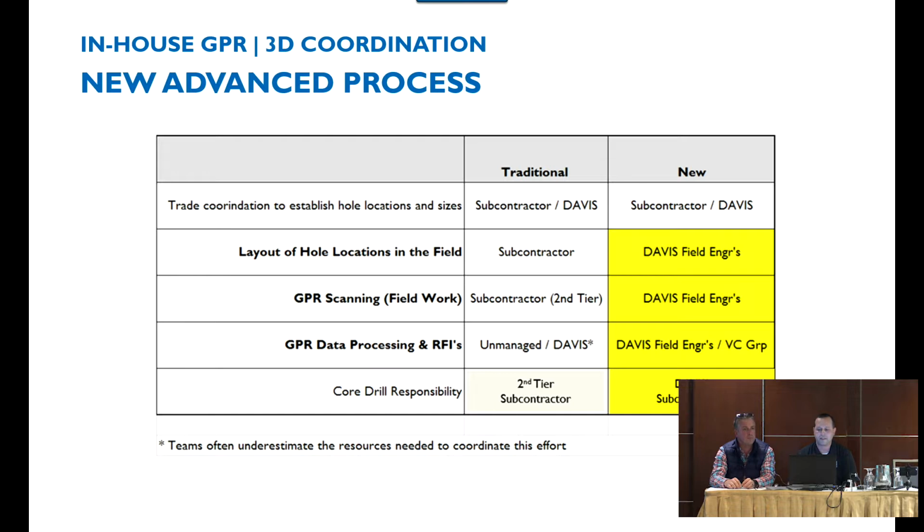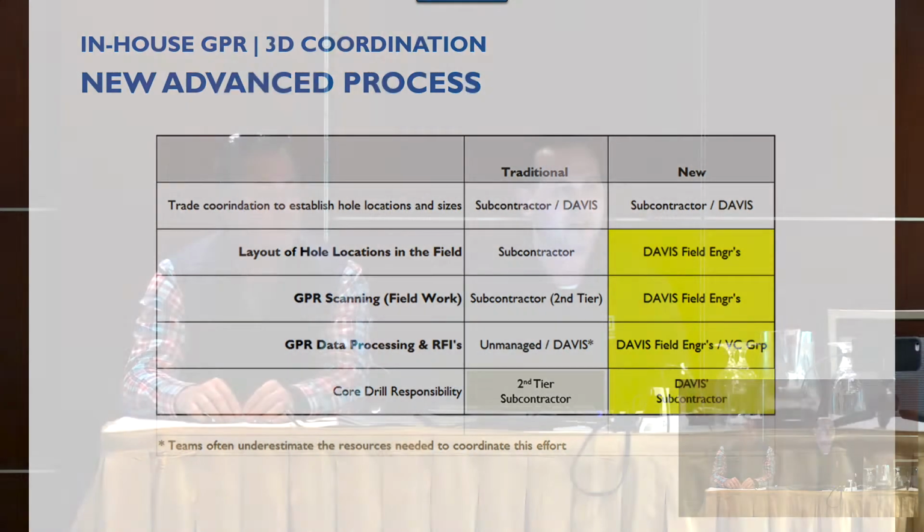So now we basically perform all the layout in the field. We manage and perform all of the GPR scanning. We also manage and complete all of the submissions. And we also own in our scope the core drilling subcontractor. So we manage everybody, start to finish, and in between.